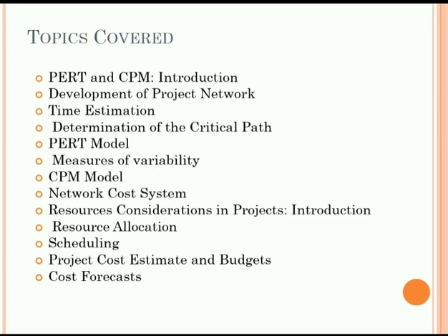The next thing we have to manage in communication is managing the communication. This is the process of storing, distributing, collecting and retrieving project information in accordance with the communication plan. The input for this stage is enterprise environmental factors, organizational process assets, work performance reports and the communication management plan.